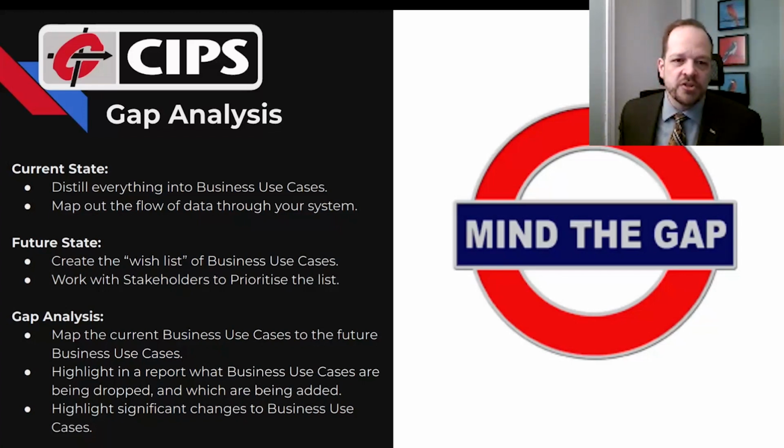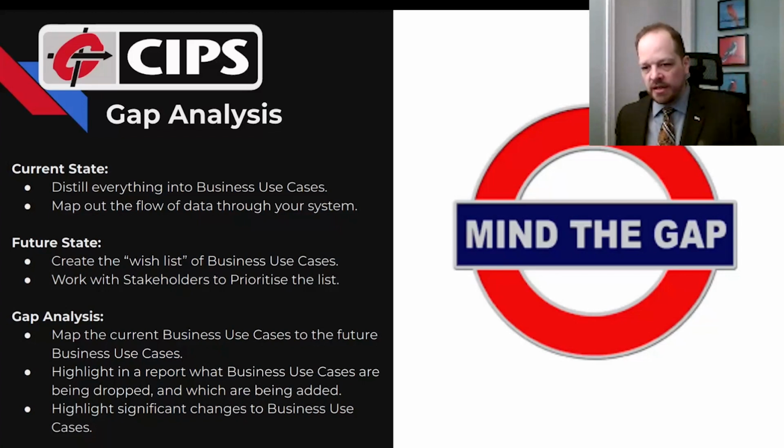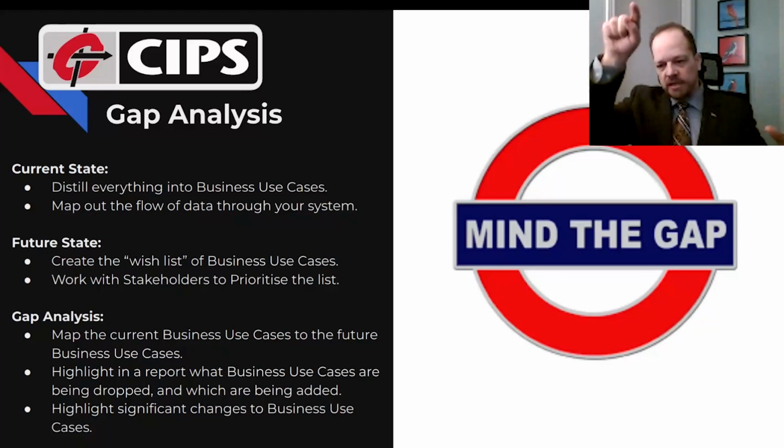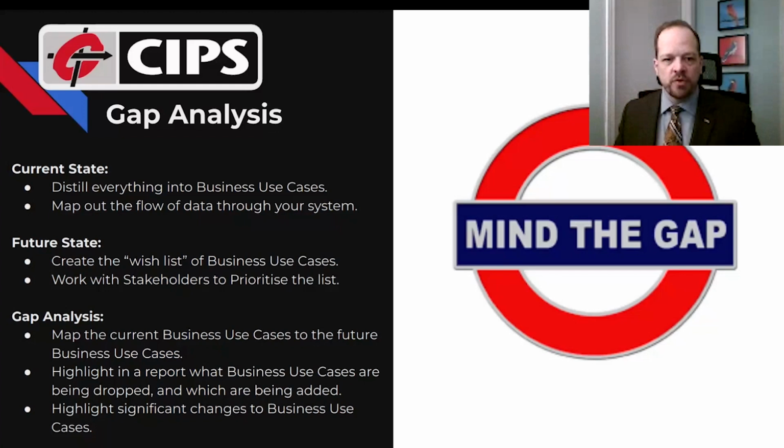So what you're doing is you're going through all the different areas, so people, technology, infrastructure, and you're basically saying, this is where we want to be, this is where we're at, here's all the things that we're going to have to work on. Tie those back to your business use cases. So again, I have to reiterate this. Do not solution at this stage.